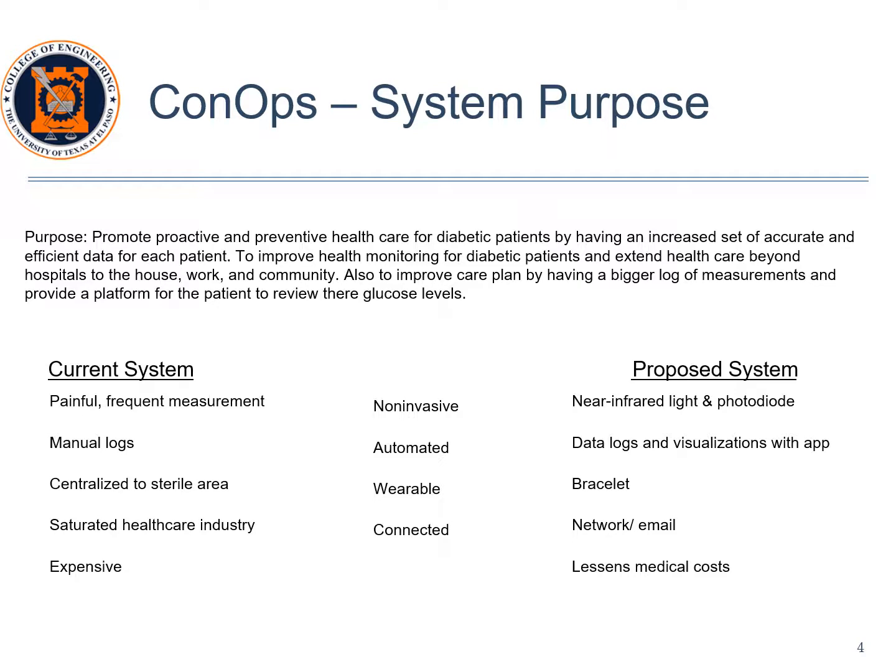The concept phase allows the team to observe a problem and brainstorm ways on how to fix a problem. The ConOps is a document in which a project team can record how the current system works, the problems with the current system, and the justification and technicalities of the proposed system, along with any trade-offs or alternatives.